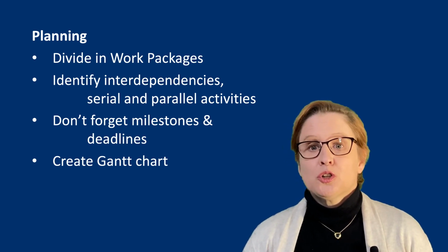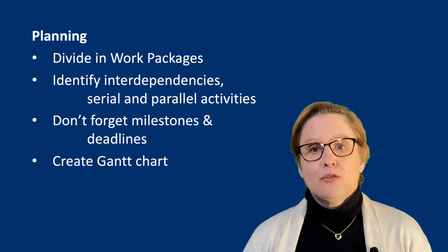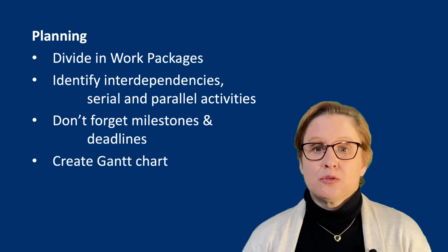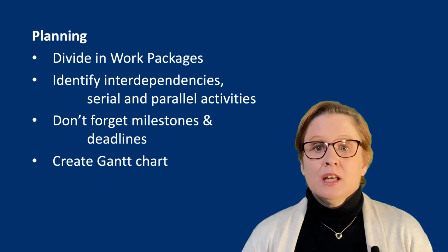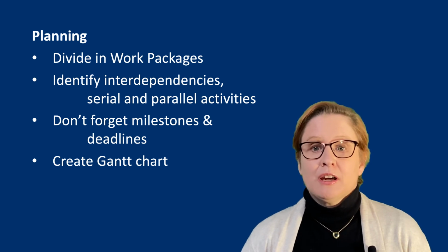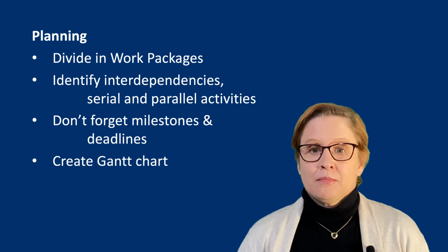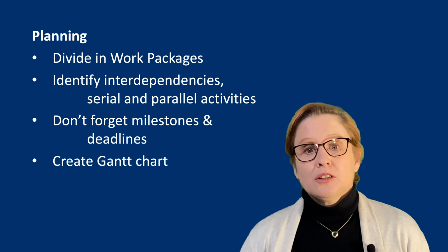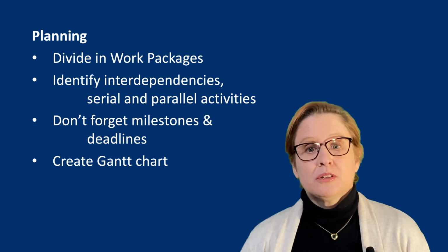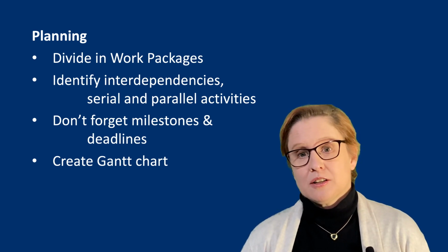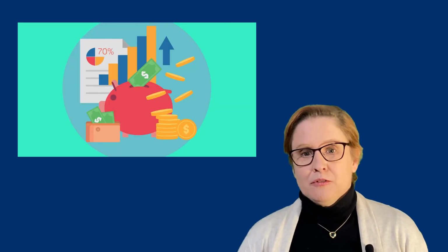Typically, you should also include a Gantt chart showing any key review points, milestones and deliverables. When writing this section, keep in mind the logistics needed to carry out the work. Try and develop the intended work into work packages that can be incorporated into a schedule of work through a Gantt chart. For external funding, you often also have to provide a budget. Check with the funding agency and your finance department on how to create such a budget.